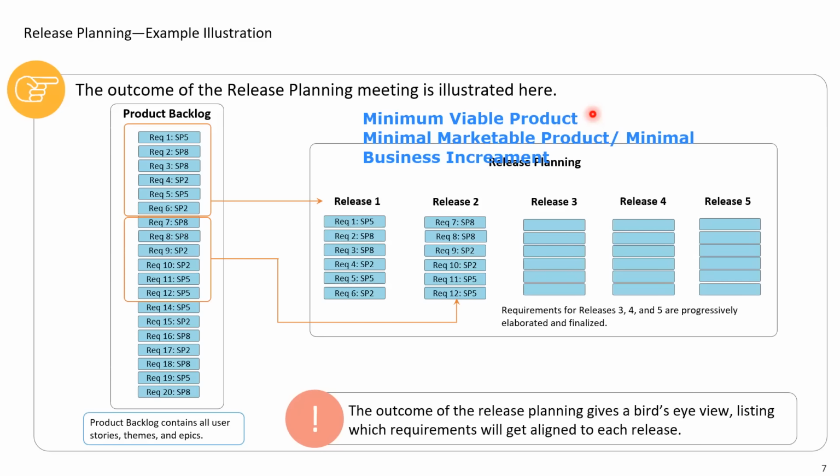So minimum viable product is a very, very base product to check whether you should go ahead with the product or project further or not. Whereas minimal marketable product is something that you have officially launched to the market. You have done a release through it, and you earn money through it also, right? The first version of products like Paytm, Google Pay, or Uber, iPhone, you can call them a minimal marketable product.